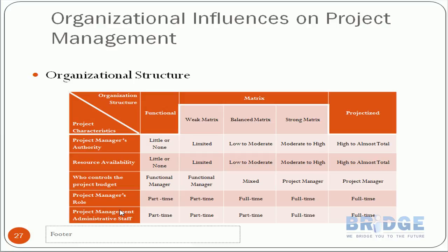Regarding the project manager's role: in functional and weak matrix it's part-time; in balanced matrix it's full-time for the duration of the project; in strong matrix and projectized it's full-time. For administrative staff: functional, weak, and balanced matrix use part-time administrative staff, while strong matrix and projectized assign full-time administrative staff to the project.